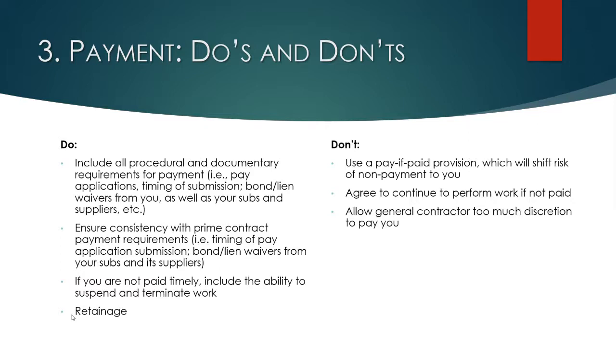Many of you on the webinar are aware of these types of provisions, but it's basically a risk shifting mechanism that the general contractor can use that basically says, hey, if I'm not paid by the owner, then I don't have an obligation to pay you, Mr. and Mrs. Subcontractor. That can put you in a precarious position. So try to avoid agreeing to those types of provisions.